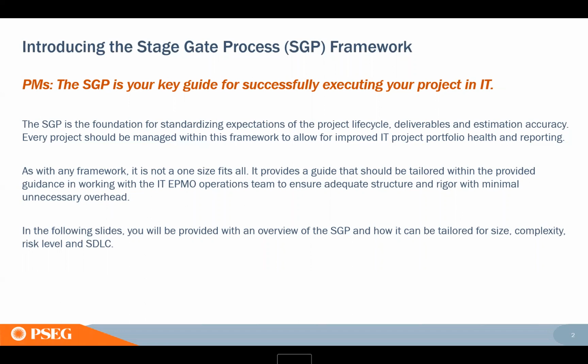Is it agile? That sort of thing. And then the second is, what is your category of project? A project that is a routine fiber rollout in different geographic locations, not redesigning anything, should require a lot less rigor than a project that is a new SAP implementation, right? Where you've got design, lots of integrations, lots of vendors potentially involved, things like that. So this is really meant to accommodate that.